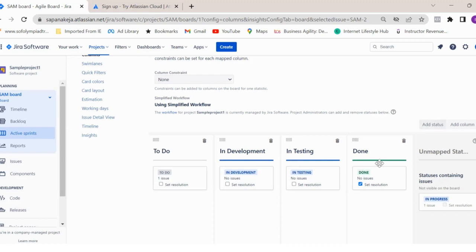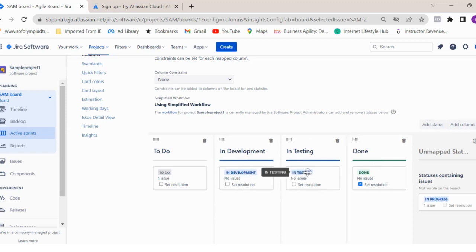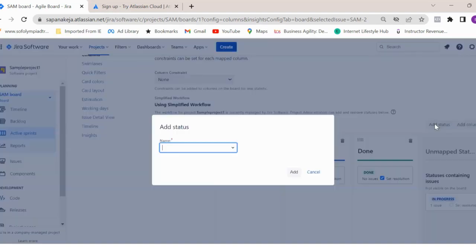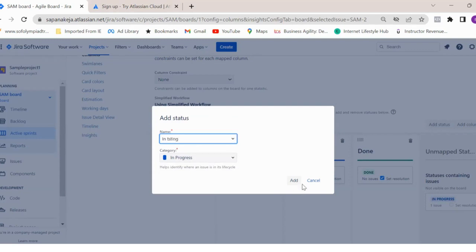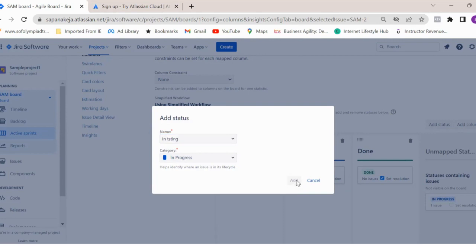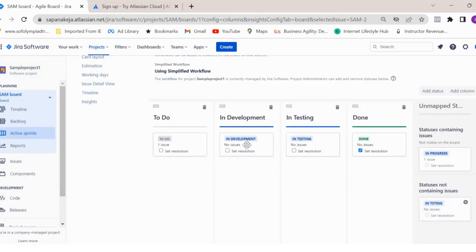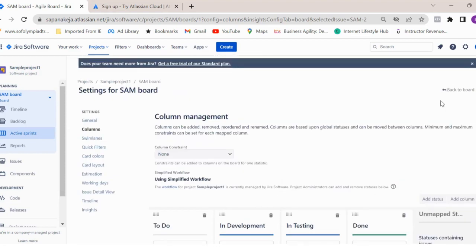Same way, you can add multiple statuses as well. By default, you will see to do, in progress, and done - these three statuses on your board. But if you want to capture or create multiple statuses like in development, in testing, you can create it by clicking on add status and just create this status like in testing, which I have already created.